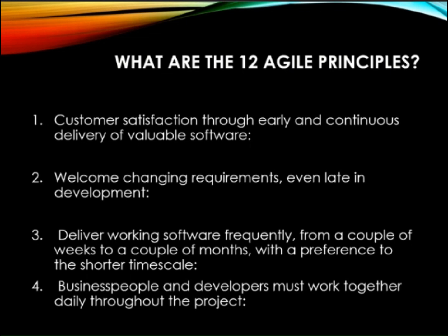Second, welcome changing requirements even late in development. So don't panic if the client asks for a change later. Be flexible. Example: a client requested dark mode just before release. The team adds it in the next sprint without complaint. Our third principle is give a small working version of software regularly. Example: Instagram introduced one feature at a time, likes, reels, then shopping, then subscriptions.